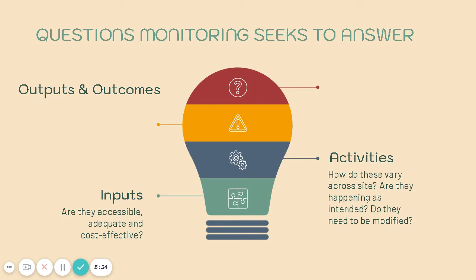So, my outcomes are what my goals are when I've designed the project. For instance, I would like to know that people are now budgeting. That would be an outcome of the training. They're saving, they're having conversations with their families about how to manage money better. All of these are outcomes of the training, not necessarily outputs, because outputs are the immediate result on the day on the site, and outcomes are kind of the ripple effects of what has happened.